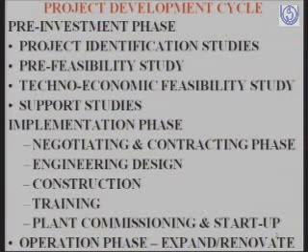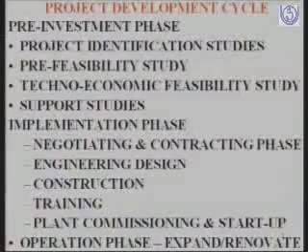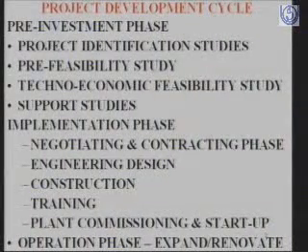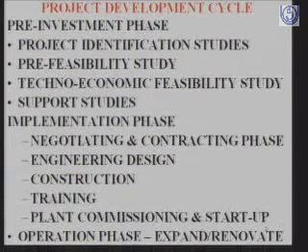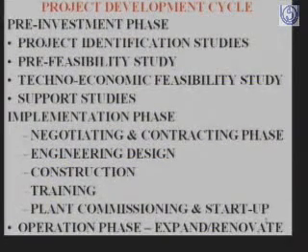Any industrial project has to pass through various cycles. One is, first of all, a pre-investment phase. It means that before you take a decision to set up a project, you have to carry out the project identification studies, carry out a pre-feasibility study, which is nothing but a preliminary technical feasibility report, followed by a technical feasibility report. Then you have the implementation phase, with the negotiating and contracting phase, where we negotiate with the contractors and suppliers of machinery.